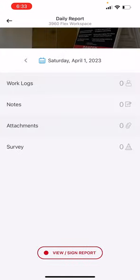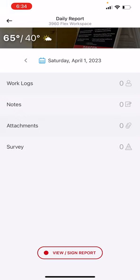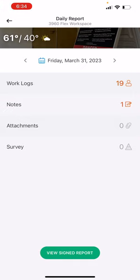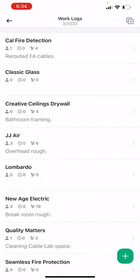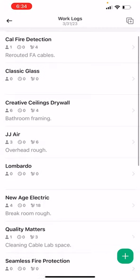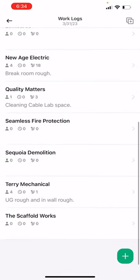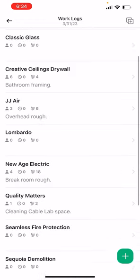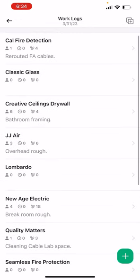So if you go to daily report, this is what you see. Your work logs, notes, attachments, and survey. So let's go back to Friday. That was my previous, that's the last daily that I did. So as you can see, I had 19 people on site and I had one note that I did. So let's go to the work logs. So within the work log, you can see a list of all the different trades that I have had at some point in time on my project. But you can see that there are certain numbers that are attached to each trade. So let's just open up Creative Ceiling Drywall.